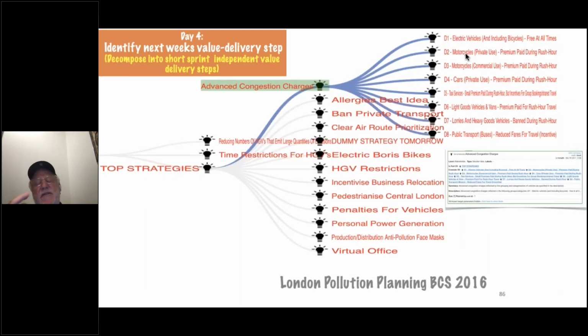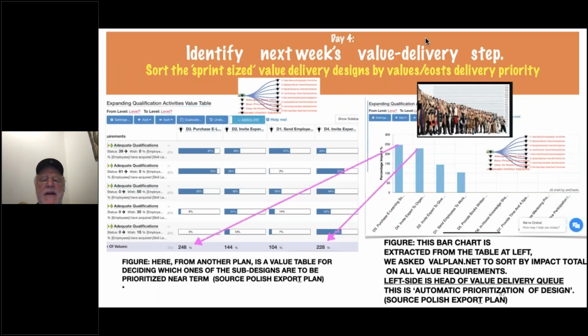Day 4, this is decomposition or extraction. I used to think about this as: don't worry about systematic decomposition and extraction, just find me something I can do next week and get on with it. But I've later matured my own thinking and say, let's decompose and pick one of these to do next week, and let's do it and get some experience. Because this decomposition takes an hour or 2, we found you might as well get it done this week and get an overview, and using it, build a table.